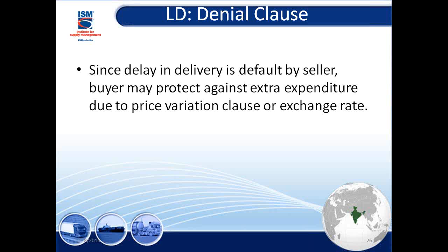So the denial clause has to be there. And there could be also, your currency may change up and down. So you will be very happy, I got liquidated damages. You may be patting yourself on the back, but then the guy is smart enough, they'll send a note to you, sorry guys, now the rupee has become weaker, you have to pay me more, or the dollar has become stronger, whichever may be.